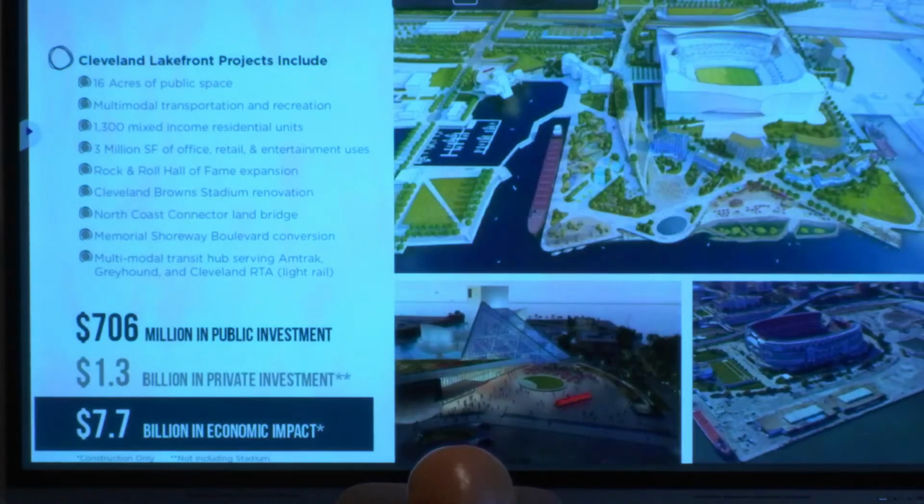When you look at the lakefront, we had the 60% drawing of the master plan produced last year. That continues to be refined with feedback from stakeholders, and is getting closer and closer to being ready for more refined construction drawing work and cost estimating, and that includes the land bridge, which would connect Mall C to the lakefront, and any changes to Route 2. So we're in process there, but it's a little less defined, less specific than the riverfront work.